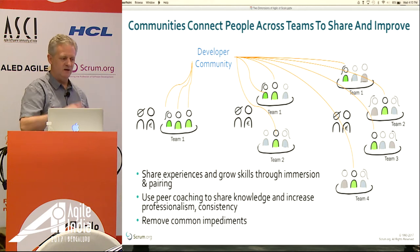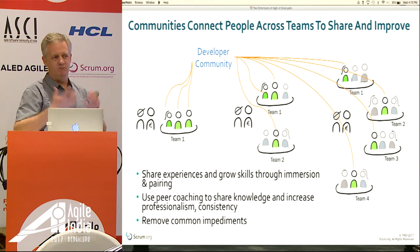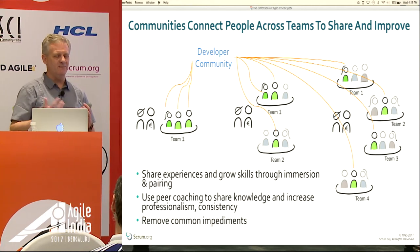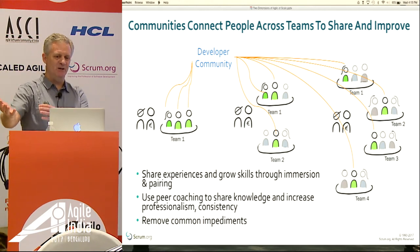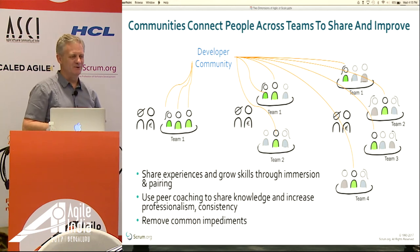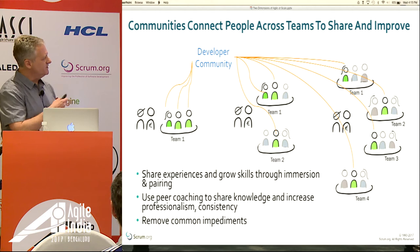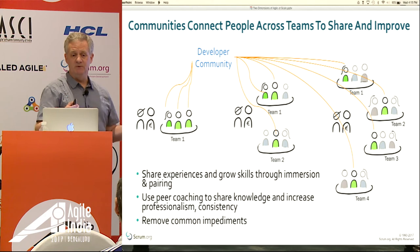Or it might be, Steve and I do something similar for our own community around different things. We ran across a really interesting forecasting tool recently that helps include statistical probabilities in the forecast, so you can get a better sense for not just what date you're potentially going to be able to ship this functionality, but what's your probability of shipping. It's like, well, our chances are slim to none based on, let's say, the probability distribution. It's not zero, but sharing information across this community ends up being really an important way to grow people.